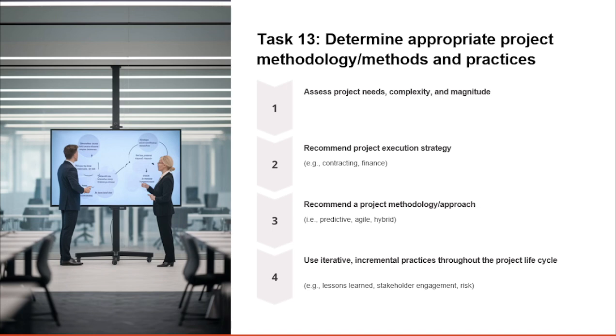First, you need to consider the stakeholder needs and expectations, the level of uncertainty and change, also the organizational constraints and resources. What else do we have? We have also the risk profiles and dependencies. And the answers to these questions will reflect your understanding of how these factors influence the choice of project management methodology. For example, a highly complex project with changing requirements might benefit from an agile approach, while a predictable, well-defined project might align with a predictive methodology.